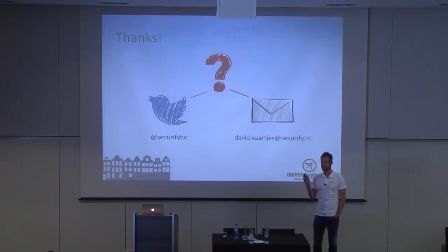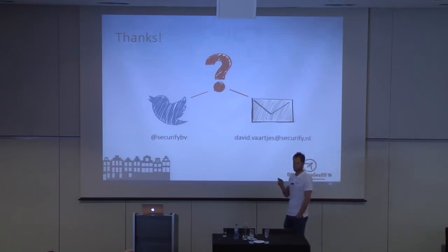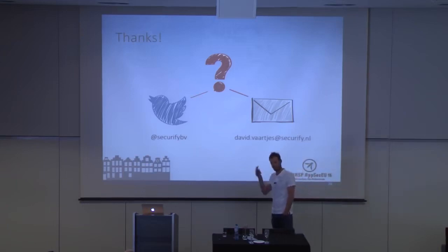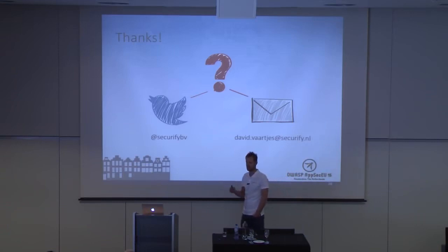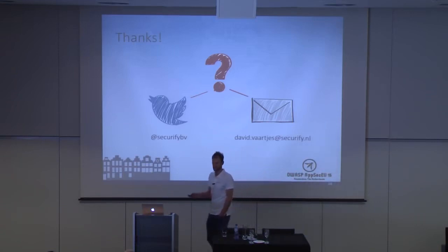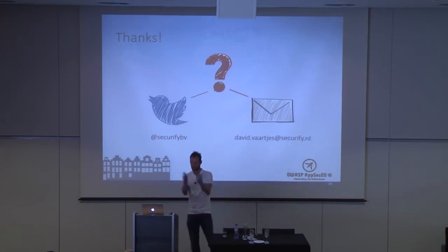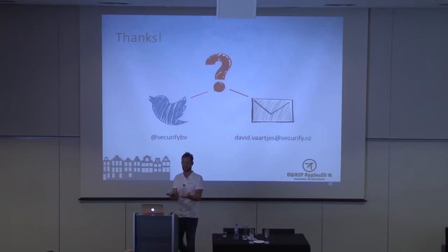Yeah, so you can do your threat modeling in the grooming, but you can even be earlier than that. At some point we also just ran through the backlog ourselves just to work ahead on anything. And if we saw some kind of things that we think might introduce issues, we got together with architects, so the team wasn't working on the user story yet, but we got it right already before the team even starts discussing it in their grooming.